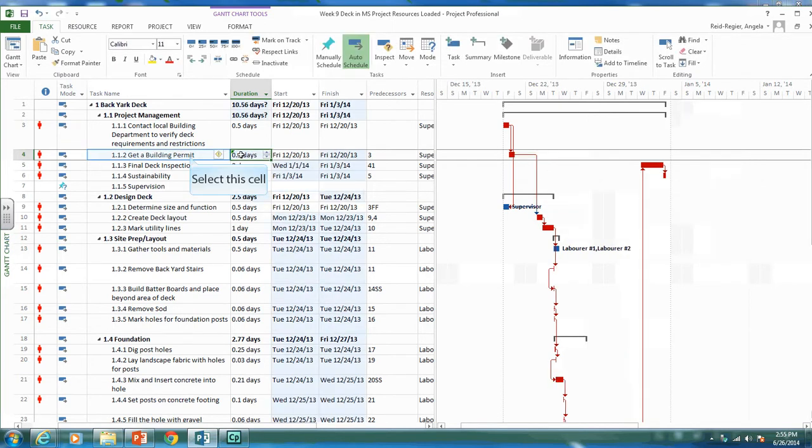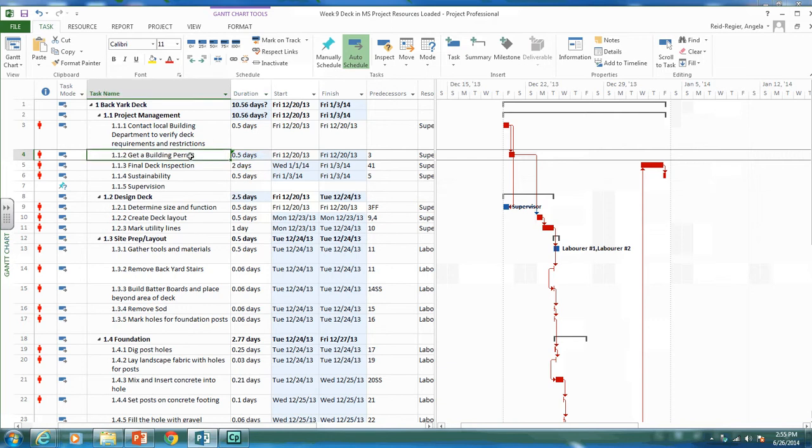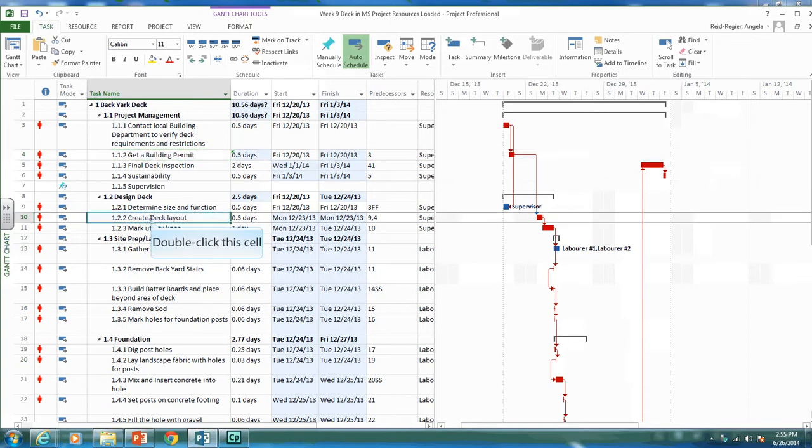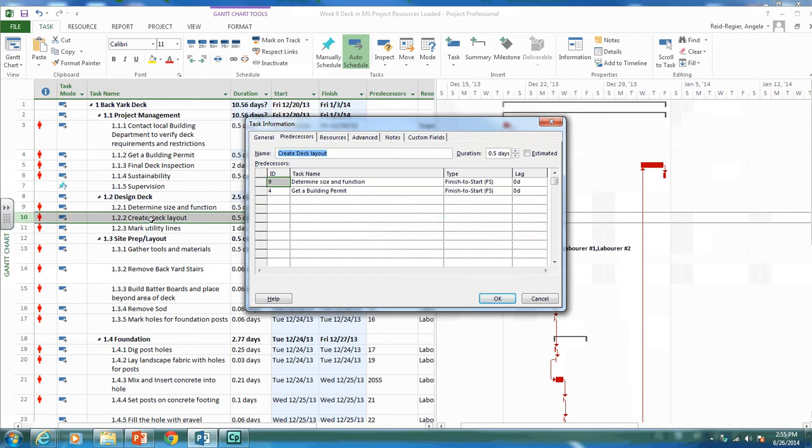Now it's important that we put the lag with the successor. This is activity four, and we can't start creating our deck layout until we have our building permit. So let's go to that activity.